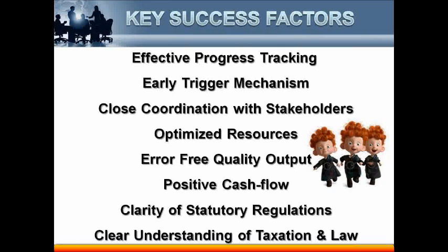If it's something where it involves high capacity cranes deployment, for example, or we are talking of something where the resources are very limited and very expensive, then we might have a trigger mechanism at every level. But ideally, the early trigger mechanism starts at 90 days look ahead. So that's one of the early trigger mechanisms which we have been using.